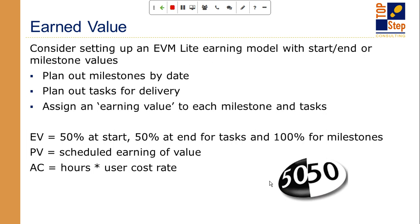But in many cases it'll be, I'm going to break this up into 4 pieces, and the first piece is going to be the most work, so I'm going to charge you 50% of the project. And then the second one is going to be light, that's only going to be worth 10%. And then the third one is worth 25%. And the last one is the 10%. So you could have varying rates for the payment plan.